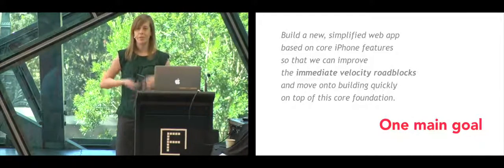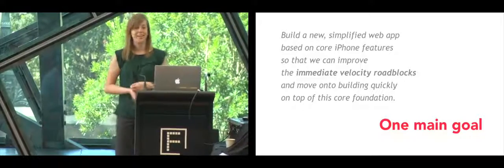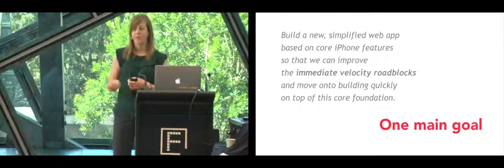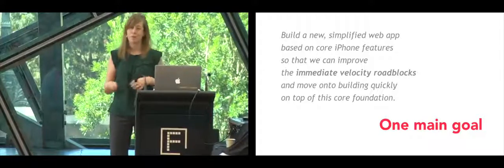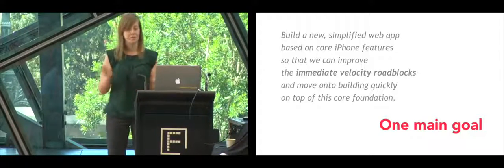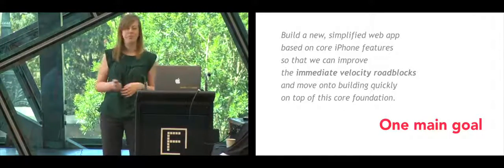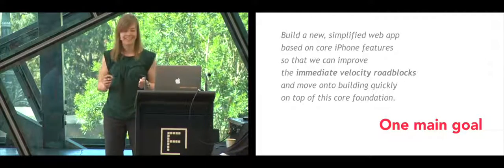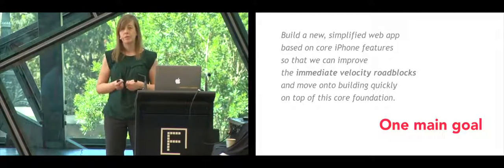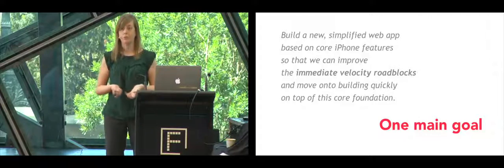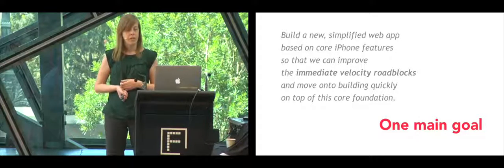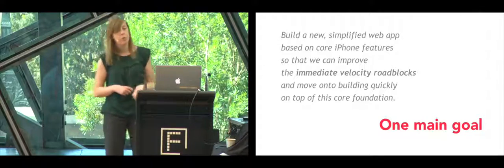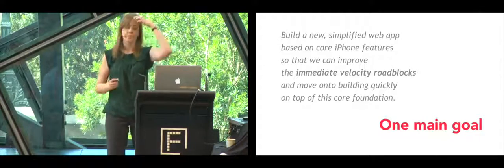And the reason for having this one specific goal is that the possibility of starting over is very exciting. It's really tempting to try to work on everyone's favorite features and issues and problems and try new technologies and doing everything perfect and new and thinking that this time we'll get everything right. But this lack of focus makes it very difficult to actually finish a project like this. Having one goal in mind made it easier for us to focus and reject unrelated changes.